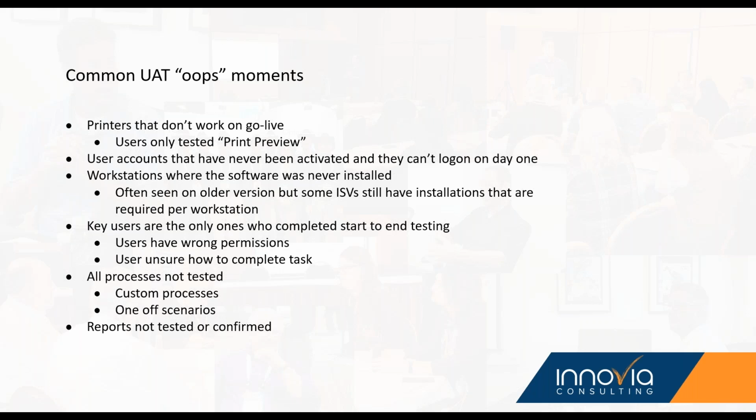I know I'm not testing for 6 months, but I need to start building out my testing opportunities now, because there's another opportunity for failures. We don't test one-off scenarios that may rely on custom function, custom code, or just knowledge. We have to ensure that all of those are addressed.